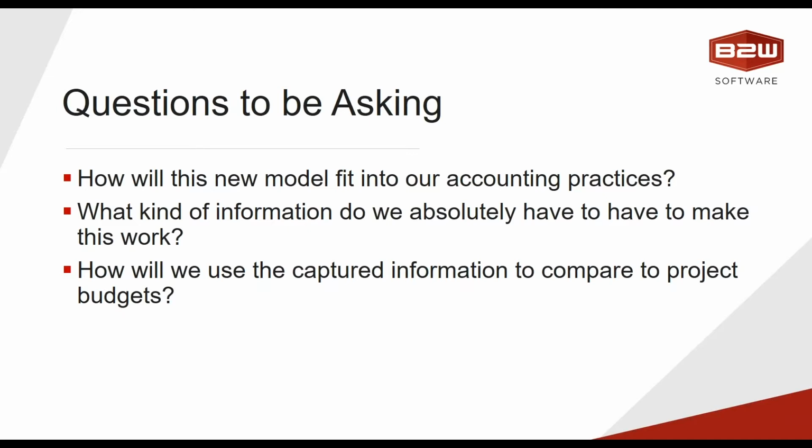So how is what we're trying to do going to fit into either the current accounting package that we have or the functionality that we're gaining in a new accounting package, if that's why you're creating codes? And what do we need to know for this to absolutely have to work? What is the bare minimum of information that, if we don't have this, then the whole thing was for nothing? And that's where you should start with making the codes and deciding what needs to be where.